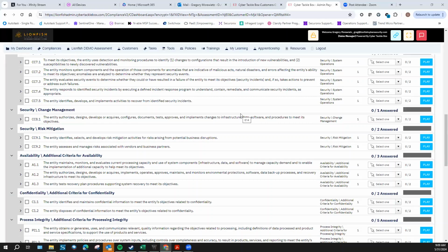It all should be laid out in the change control doc, and it should be signed. That's what the approvals are. It should be signed at the bottom and dated. And it talks about risk and what the change is for, what it does, what it's good for. So you're going to have a whole entire change control process